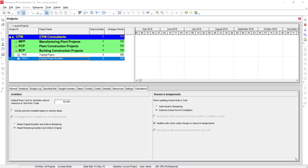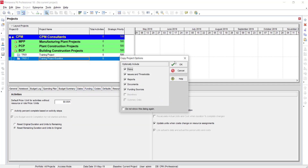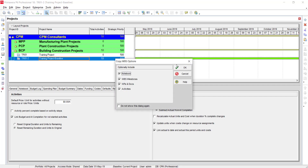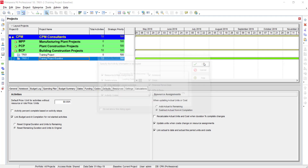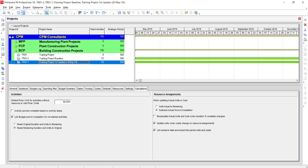I am going to tell you how to update the progress using different percentage complete type methods. To update the first progress, I am going to make a copy of this baseline project, following the same steps as we have done earlier for copying the plan. After successfully copying the plan, I will rename it as 'First Update' and mention the date — suppose I am updating after 20 days, so I will change it to 20th May for reference.